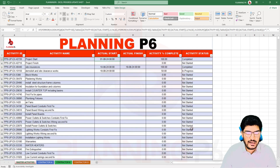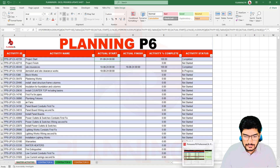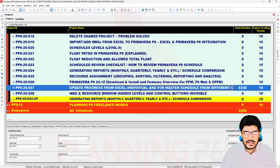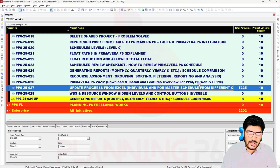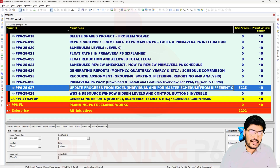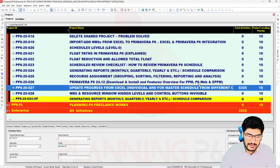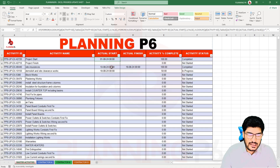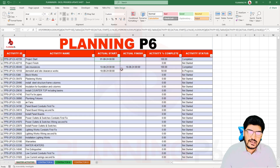I have also prepared a Primavera schedule — you can see there is a separate schedule here: 'Update Progress from Excel,' for both individual contractors and the master schedule. If you have three, four, or five contractors, you maintain a master schedule, give them the same activity numbering, and take the activities from the master schedule. This will automatically track the activities and give you a comprehensive view in one sheet, so you can copy and paste data from there.